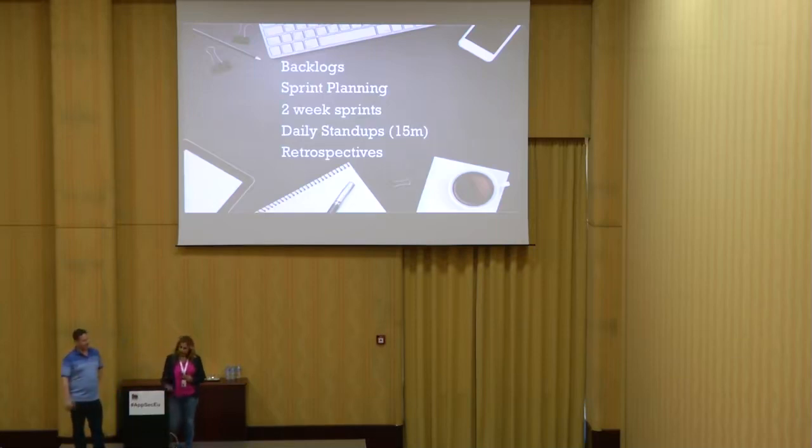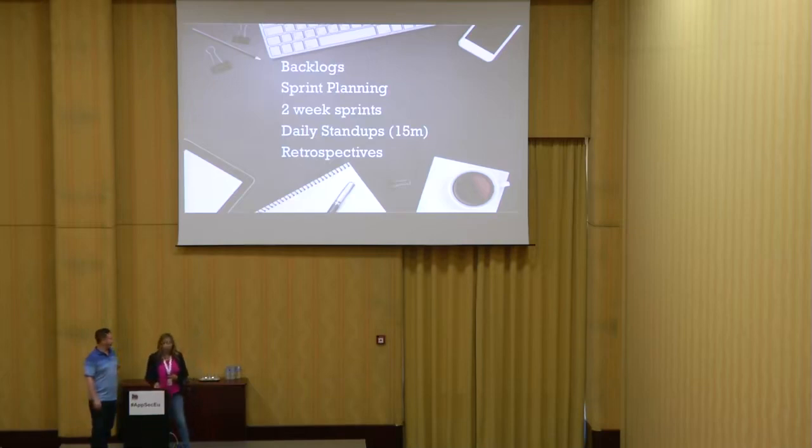Yeah, so here's kind of what we did. We created a Jira board. We had one of our Jira folks create a Jira board for us. We set up a backlog, which is all the testing and other things that we were doing on our team. So we had the backlog. You have a sprint planning meeting at the beginning of every sprint.